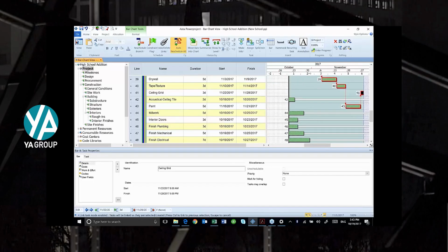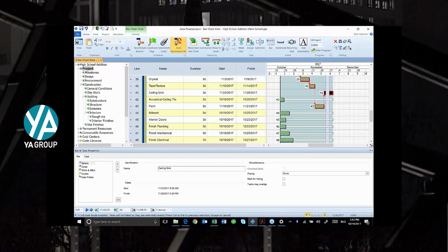Zoom out so you can see me here. Watch me doing this. I'm going to do my ceiling grid, and this is a holiday period. You can see there, that's what that shading is for. So from ceiling grid, I'm going to install my air vents, and then from there, once I get those in and my electrical in, I can do my ceiling tile.